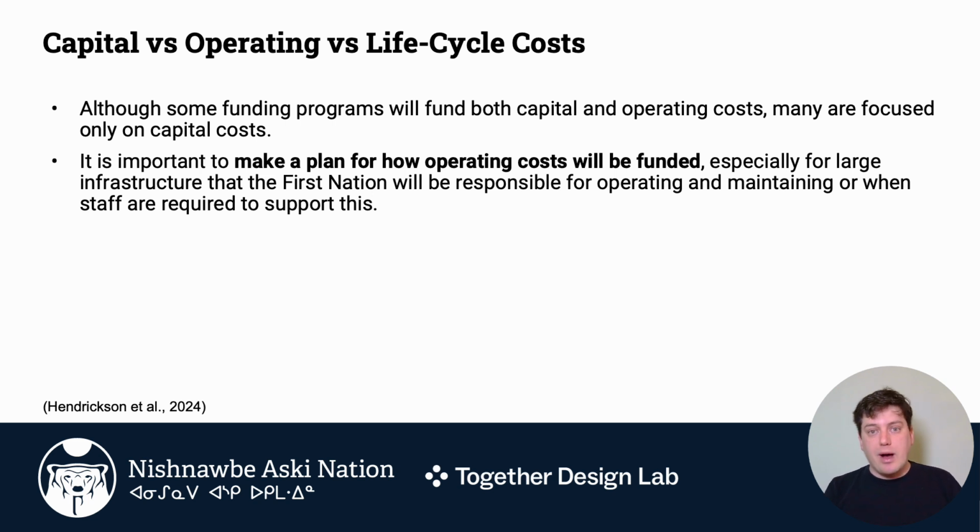And while unfortunately most funding programs right now only focus on reducing capital costs and driving that capital cost down without a consideration of the life cycle cost, that doesn't mean that you, as the project manager and potentially someone who's going to be involved in the asset management in the long term, can ignore the full cost that will be incurred for this asset over its total lifespan. You need to have a plan for the full cost of the asset, even if the funding application you're filling out or the private funding source you're going to doesn't totally consider that.